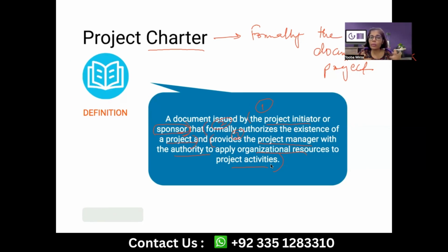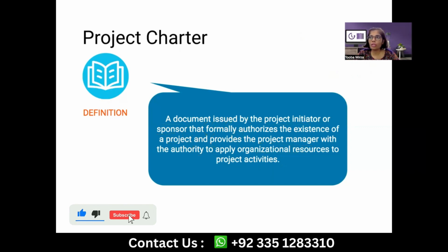We don't want to keep it in a documentary form, that would also become an artifact which would have a record, but it's better to have it in the form of a document. So the project charter is the first document, ideally issued by the project investor or the sponsor, and it authorizes the existence of this project and the project manager in the organization for the duration of that project, and it gives the project manager the necessary authority, the necessary go-ahead to apply the organization's resources to the project activities.